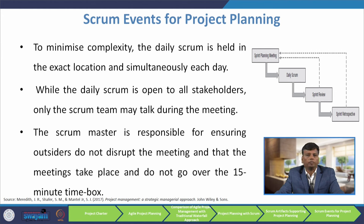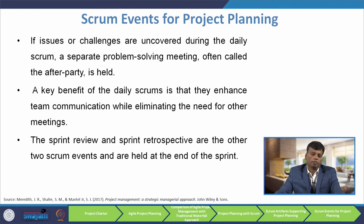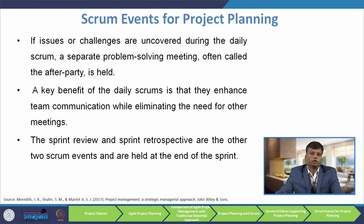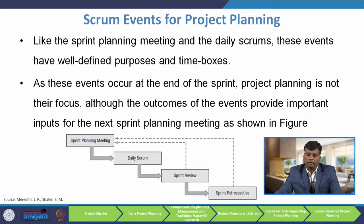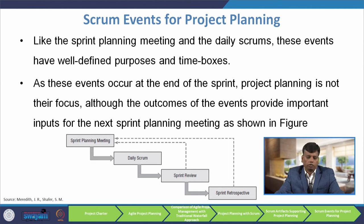If issues are uncovered during the daily scrum, a separate problem-solving meeting often called the 'after party' is held. A key benefit of the daily scrum is that it enhances team communication while eliminating the need for other meetings. The sprint review and sprint retrospective are the other 2 scrum events held at the end of the sprint. Although project planning is not their main focus, the outcomes provide important inputs for the next sprint planning meeting, with feedback flowing from sprint planning to daily scrum to sprint review to sprint retrospective.